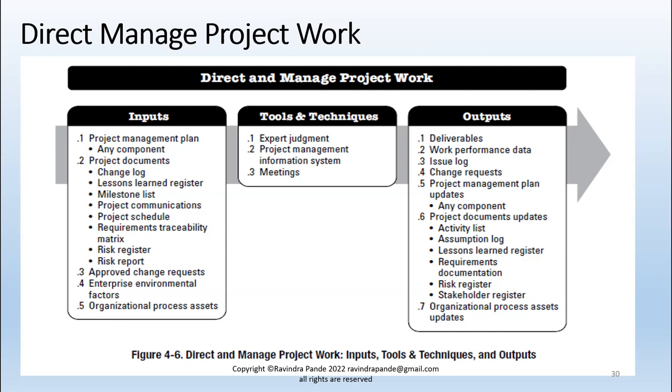Then the lessons learned register. As we talk about knowledge archival, this is one of the activities we do whenever we archive knowledge. So we include the lessons learned in the knowledge archival system with the name, date, author, who initiated, who applied, and all those scenarios in the organizational knowledge management place or knowledge management storage area.